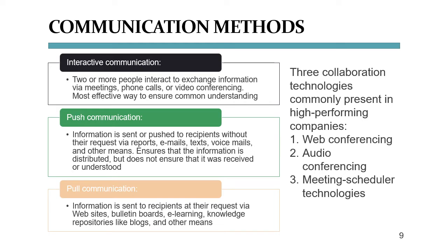Then there is push communication, in which you actively deliver information to your stakeholders, as with emails, voicemail messages, texts, and the like. And there's pull communication, in which a stakeholder has to act to retrieve the communication. That can be web portals and blogs or internal SharePoint sites and so on. The most important thing here is to ensure you work with the communication method of preference for your stakeholders or the organization.